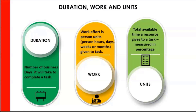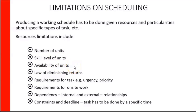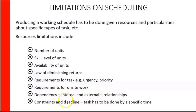So this is what you have to be balancing as you delve into allocation of resources. Producing a working schedule has to be done given resources and particularities about specific types of tasks. Resource limitations include number of units, skill level of the units, and availability of units — you may want somebody on the project 100% of the time and only get 50%. The law of diminishing returns: after a time, you add more resources and get less and less production. Requirements for the task may include urgency or priority, requirements for onsite work, dependency, internal and external relationships, and constraints and deadlines — the task has to be done by a specific time.